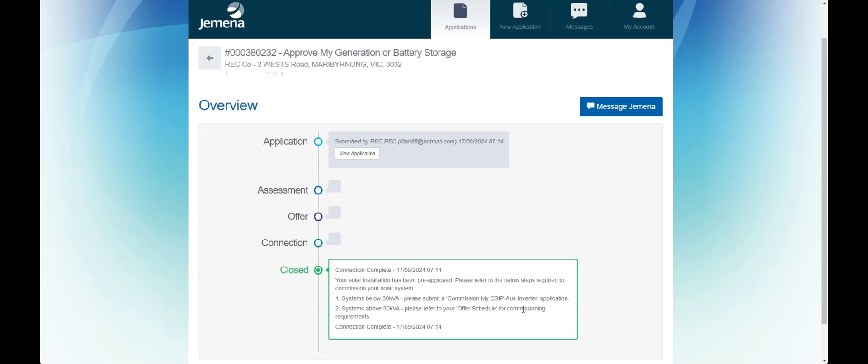Note for systems above 30 KVA they are referred to as negotiated connections. Further fees will apply.